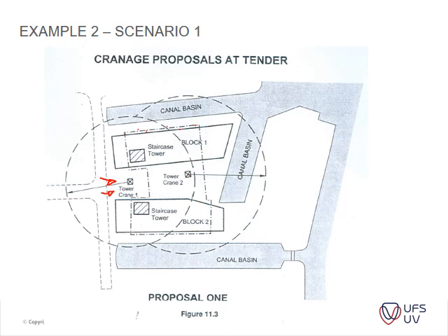So you can see that's more or less what they've got for their method statements at tender stage. Okay, are you guys comfortable with that? So it's just a method statement. This is how they thought about it. The 20-meter radius reach is not really necessary. There's something which I don't say here, that one should also consider is regulations. Is how far a crane can actually reach over a public road and into someone else's site. So that's something that one needs to consider as well.